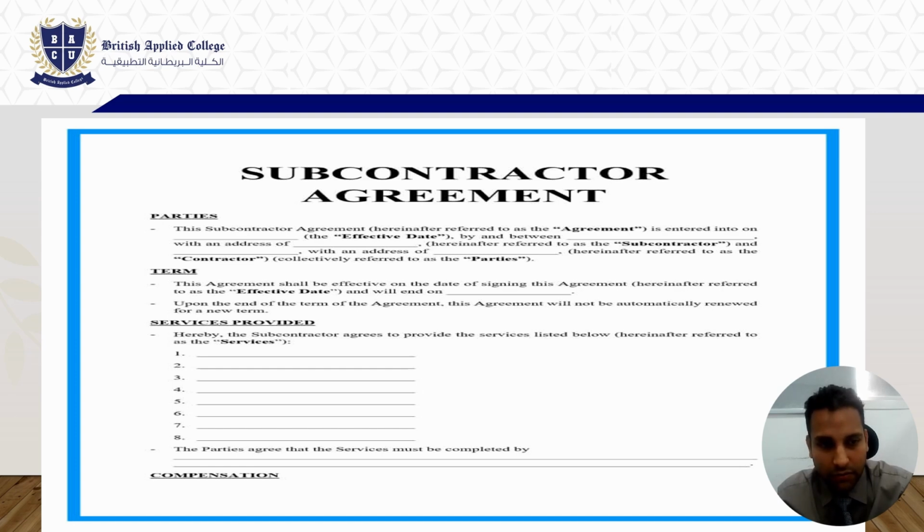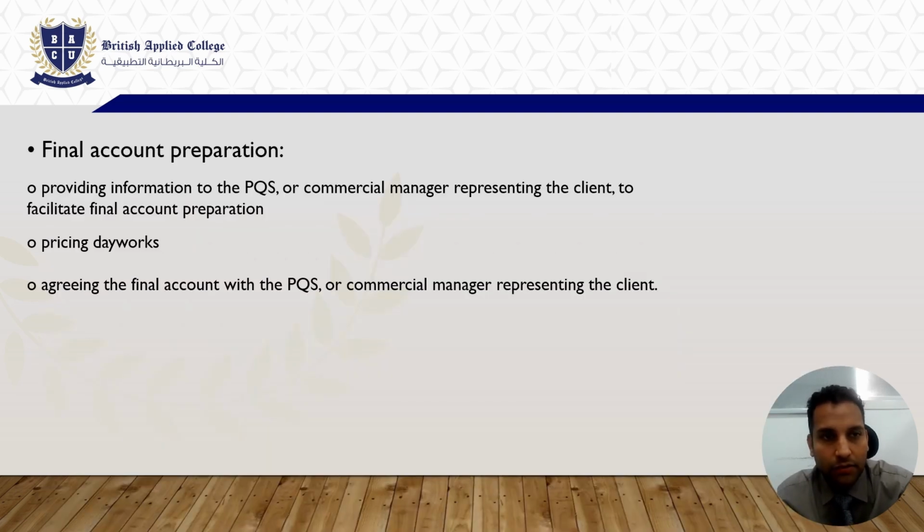Final account preparation is one more role of the quantity surveyor when he works for the contractor. In that final account preparation, you will do your daywork pricing, meaning how much the amount goes on a daily, monthly and yearly basis, and agree the final account with the quantity surveyor of the client.